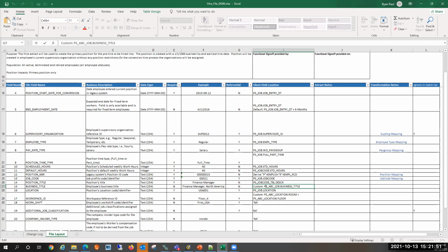If you keep on with the software, the impact to your conversion is that it's an integration point. So then it becomes, all right, what do we need to do from an integration perspective to make that happen? Can our third-party software support a non-production test, or how can they handle testing? Most software providers have the ability to do testing outside of production, but depending on who you're running with, they may not.